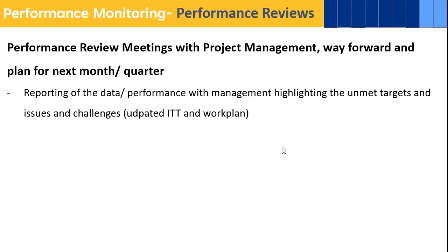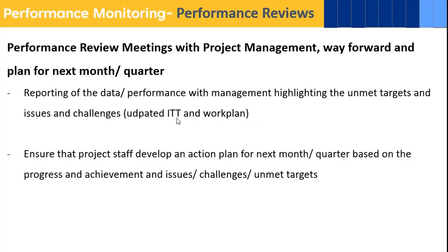So in this session, you discuss the performance, the way forward, and the plan for the next month or the quarter. So here you report the data performance with the management, highlighting the unmet targets and issues and challenges, both the work plan and ITT. Here you ensure that project staff develop an action plan for next month or quarter based on the progress and achievement and issues, challenges and targets that you have discussed under these steps.